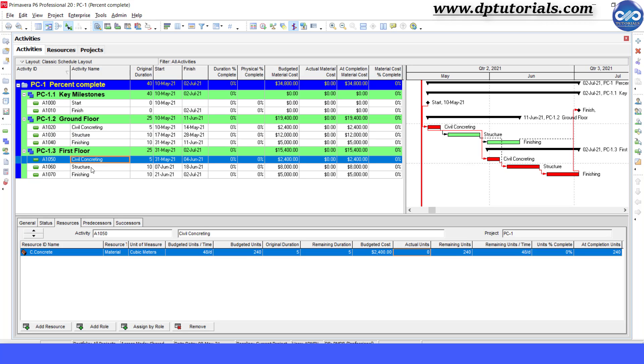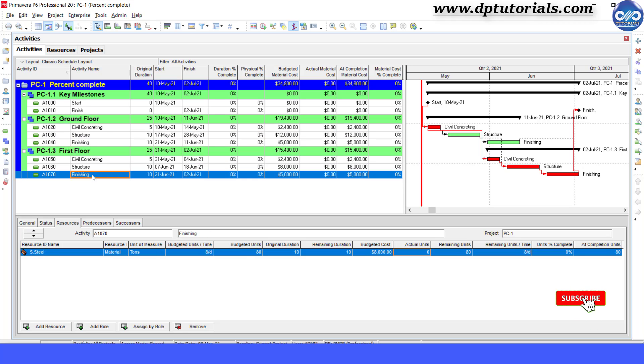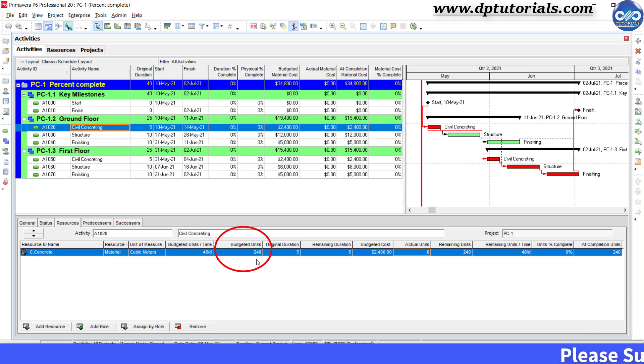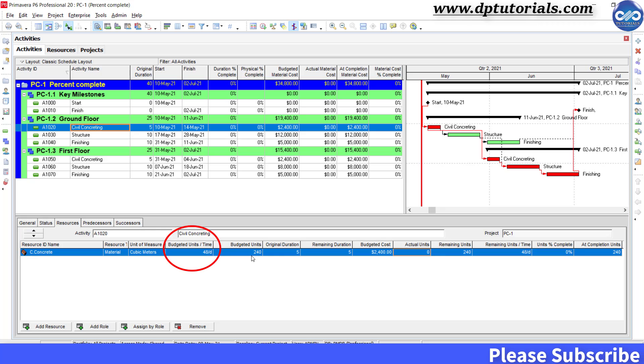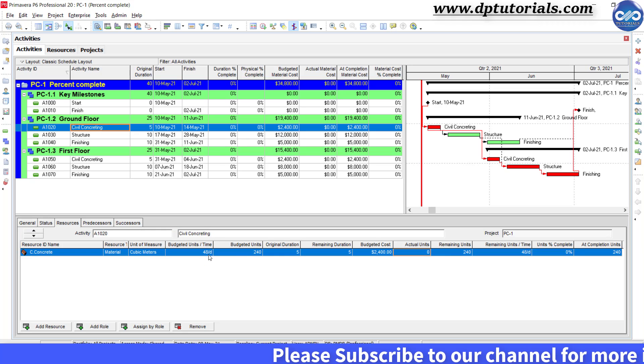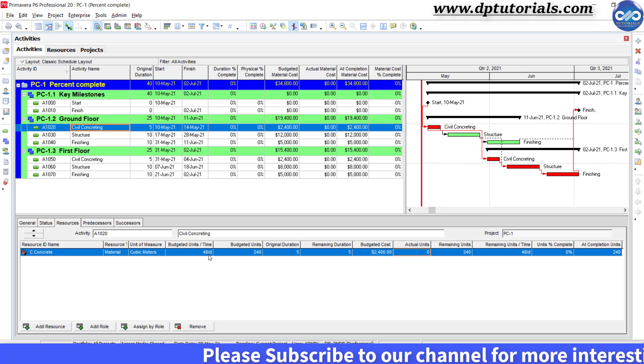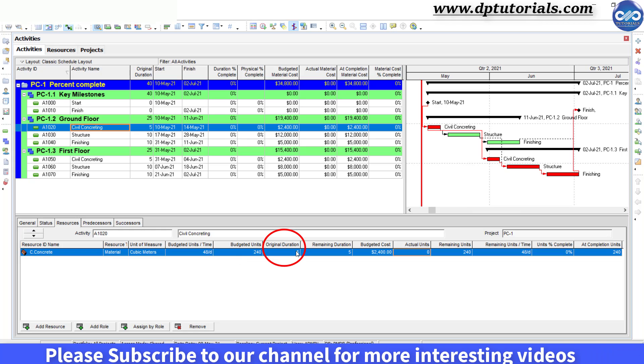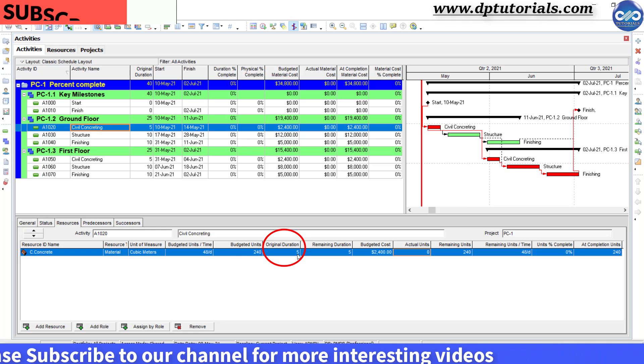For the first civil activity, the budgeted units is 240 cubic meter. Also, the budgeted units per time is 48 cubic meter per day. The original duration of this activity is 5 days.